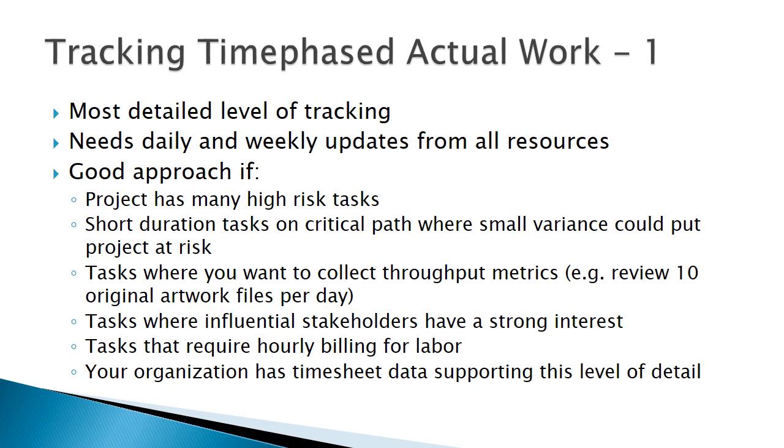There are tasks where you want to collect throughput metrics, for example, to review 10 original artwork files per day. Where there are tasks with influential stakeholders that have a strong interest. Where there are tasks that require hourly billing for labor. Or your organization has timesheet data supporting this level of detail, and you can influence the time reporting process to collect this data.